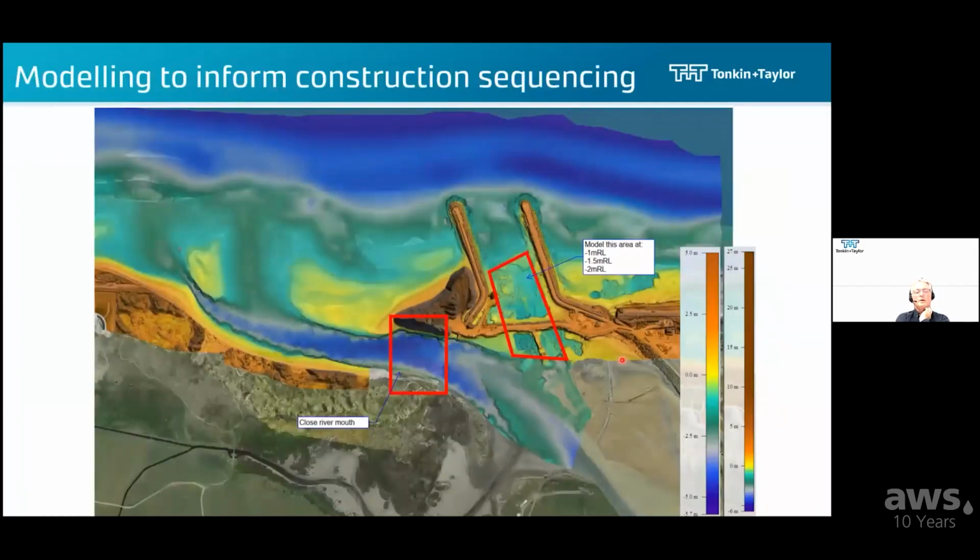So we had multiple fairly frequent bathymetric surveys being redone, because given how long the project has taken to construct, Mother Nature has not remained static over that time. We've had storms, big swells, literal drift, all sorts happen, and we've needed to update our model. It didn't stay the way it was when we first consented or conceptualized the whole project. So we needed to look at a large number of options based on what was happening in the real world and what we were proposing to do to it, and how we make sure we protect the upstream town from a disastrous flood event.